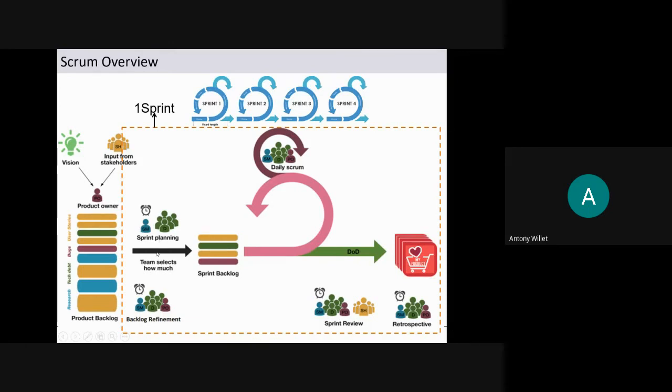Okay. Sprint planning meeting, and the Scrum Master and the team, and maybe the product owner, will be participating in this. Output is the sprint backlog, a list of requirements or items to be implemented. The sprint starts, the team takes it up for implementation. Every day they meet to discuss what is happening, and if there are any impediments, they can be resolved. And at the end of the sprint, we have an increment.